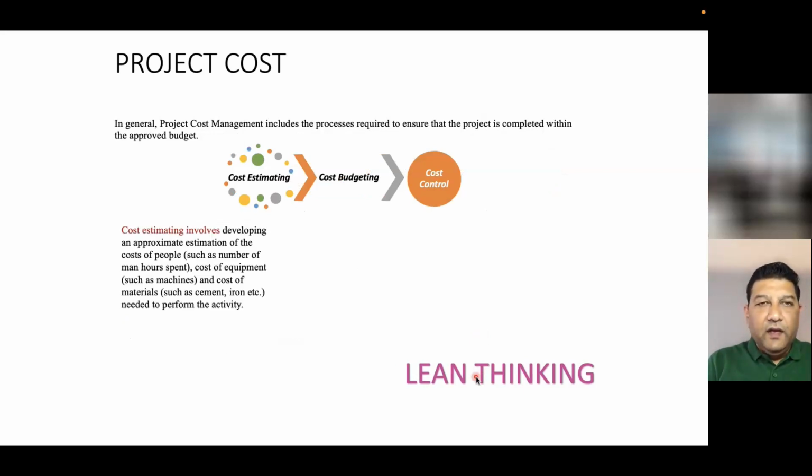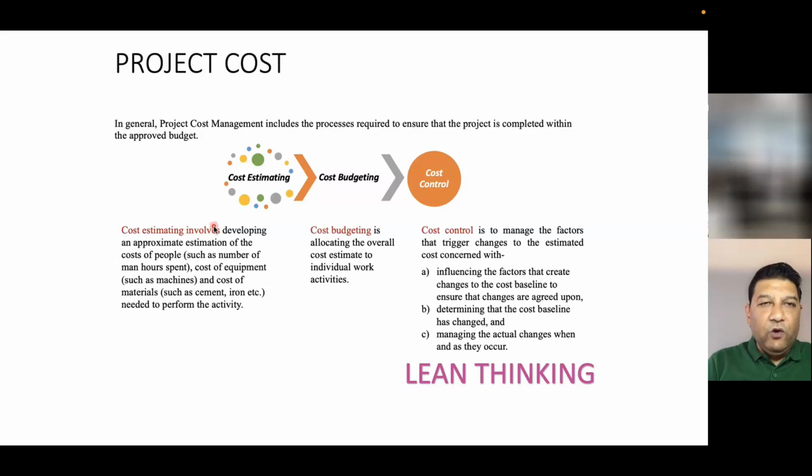Once you know the time of each activity, each task, you can allocate the cost to each task. Now, you have 5 work packages. Normally, project managers work once they know the budget of the construction. Let's say 10 million is the budget, and you need to deliver the 5 work packages given in your assessment. Sometimes they allocate an equal budget for each work package: out of 10 million, 2 million for work package 1, 2 million for work package 2. And that is all about estimating.